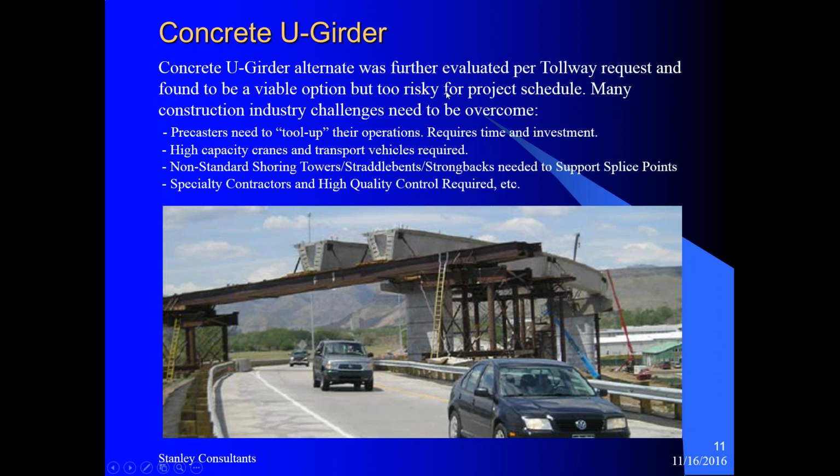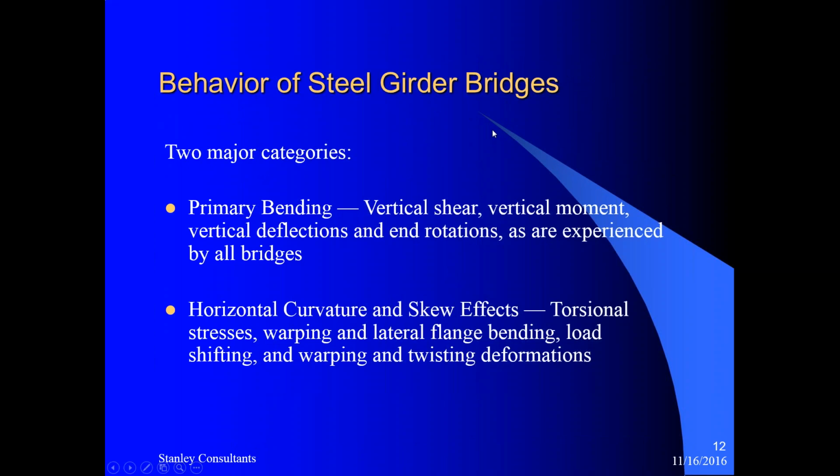too risky for the project schedule, with many construction industry challenges needing to be overcome in a short duration of time. So the final decision was a steel plate girder bridge.